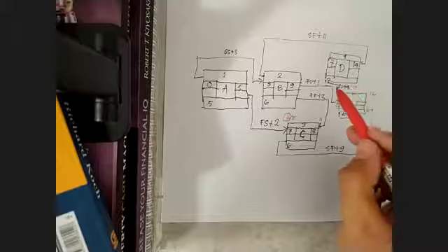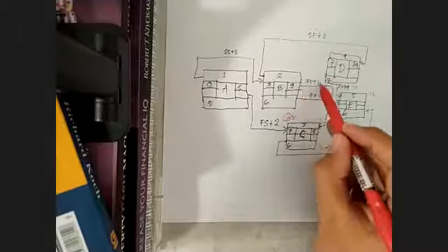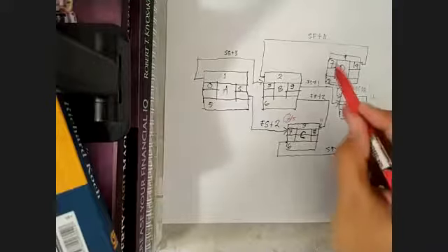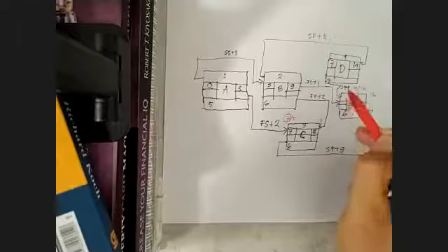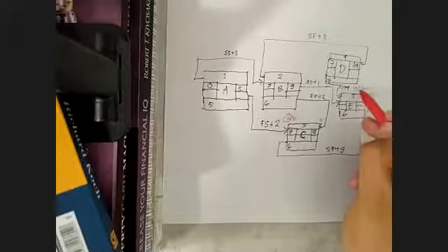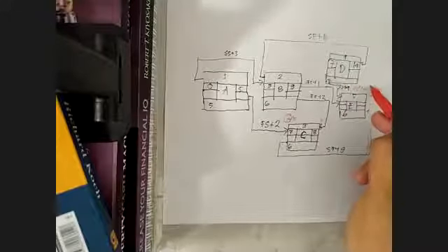Now we'll calculate for the second arrow. Finish to start plus 1. 9 plus 1, we will get 10. So the second option is 10. And the last one, 7, since this is start to start with 4. 7 plus 4, we will get 11. Okay. From these three numbers, the highest number is 11.